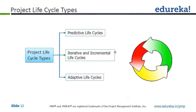In iterative and incremental, the period is around two to four months, whereas in adaptive life cycle the period is two to four weeks — that's the main difference between the two. This is done for large or complex projects in order to reduce risk, and the team gets to incorporate feedback and lessons learned between iterations.